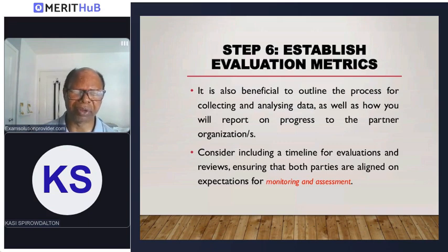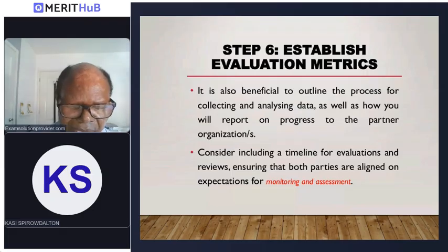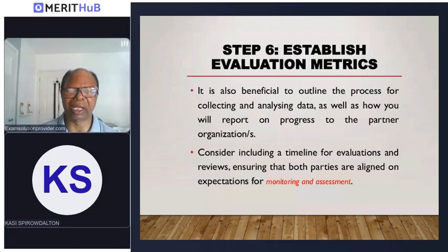You can't wait until the end of the project, maybe 3 years, and then you start evaluating and say, "Oh, it failed." It means you have wasted a lot of money. If you stop after 1 week or after 4 weeks, then you have wasted less money because you had the opportunity to save the remainder of the money. So monitoring is as important as evaluation, probably more important than evaluation itself.